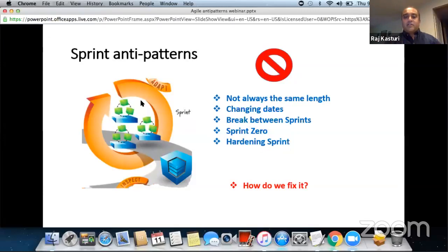If the feature is spread across 4 or 5 sprints, that's okay, as long as each sprint has something. But if I just coded something for this feature, and in my next sprint I'm going to do some testing, that's not valuable to the user. That's why it's important to finish it. It's an art of writing and making sure that is addressed, whatever feature you're working on.